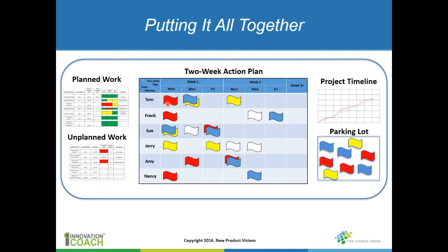So Tom's going to talk about that, and if it is done, he's going to remove that sticky note and hand it to Nancy. Now Nancy can incorporate these into maybe a project book, which is a good way to track the initial estimates of a task versus when the task gets completed. So she starts to get a feel for how accurate people are in terms of estimating their tasks. So if it's done, he removes it and hands it to her. If it's not complete, he needs to talk about that and move it to another date, or maybe move it to another team member, whatever.